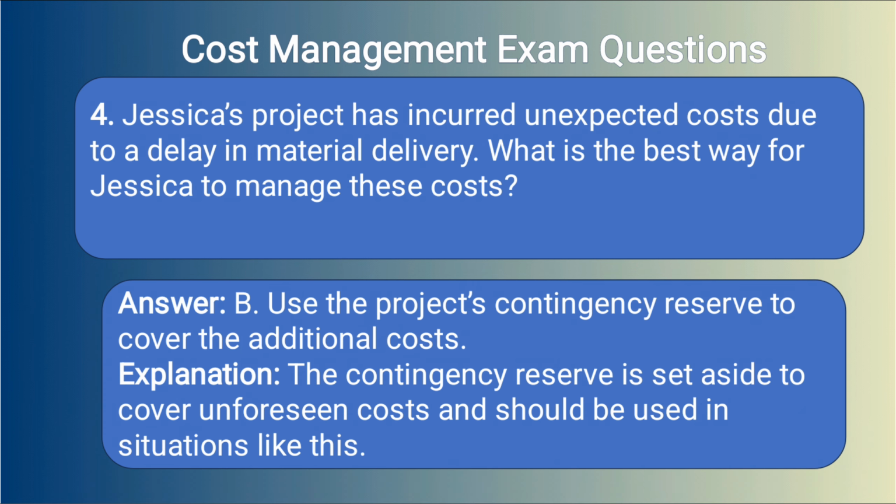Answer. B. Use the project's contingency reserve to cover the additional costs. Explanation. The contingency reserve is set aside to cover unforeseen costs and should be used in situations like this.